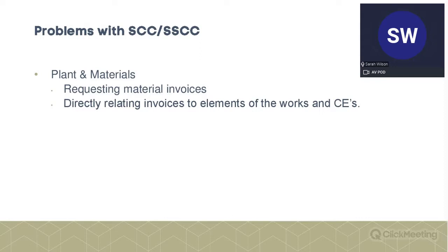Plant and materials, again, invoices shouldn't be so difficult, but again, showing that it's directly related to the works, or for the shorter schedule, was it related specifically to compensation event work? Sometimes it's a bit difficult to tell. You use, I don't know, a certain amount of concrete in a compensation event. You're not going to specifically order that. Typically, it would come as part of an order that also covers the main work, so it's separating it out.